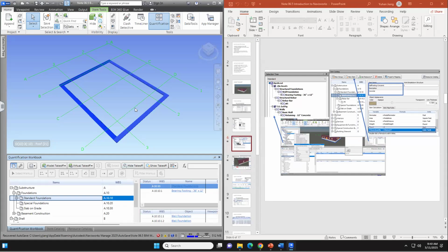Okay, so let's come back to here. We don't need to check or try with this primary quantity. If you want to try, you can type in equal to volume divided by 27. The purpose is to convert cubic feet to cubic yards, because in most cases concrete is measured by cubic yard, right? If you already did this one, okay. I have an issue, so I cannot get it, so I try to skip it, okay? Let's move into the next slide here.